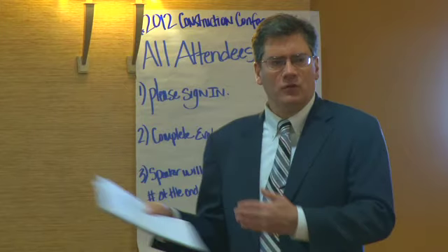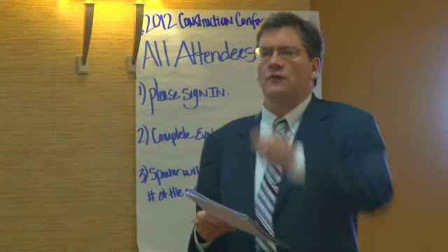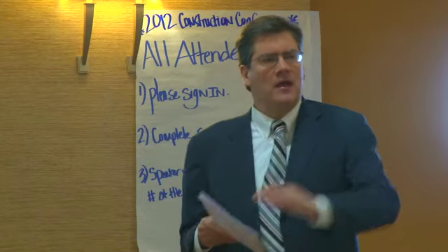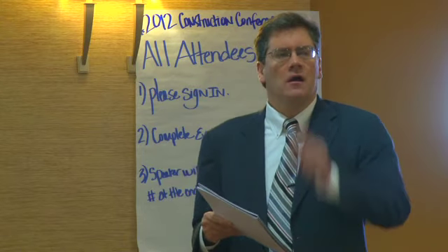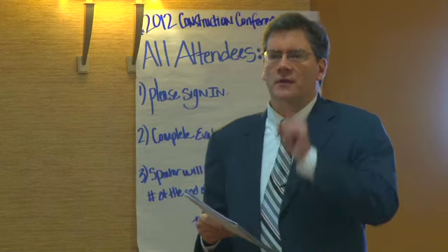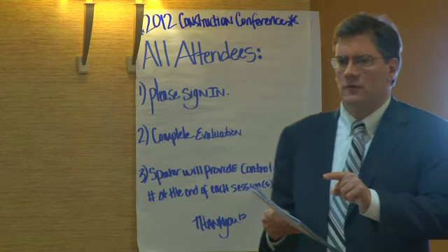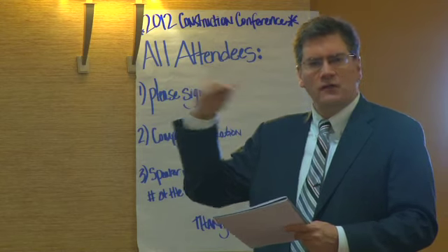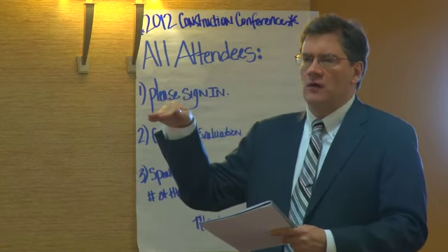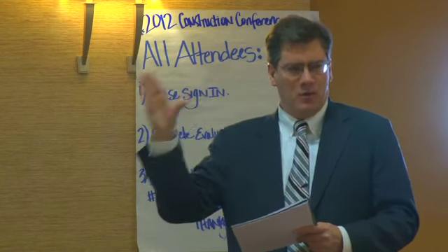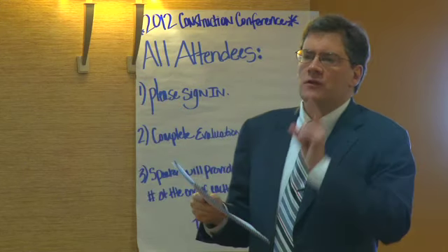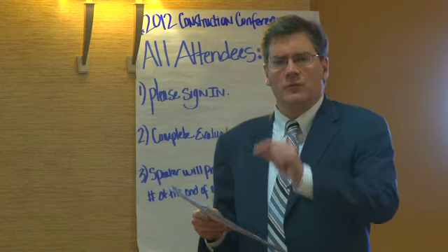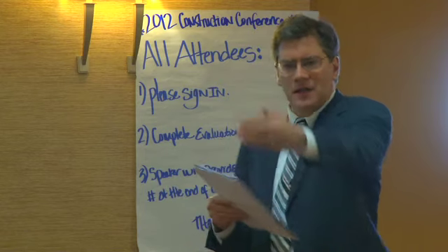Or sign a conditional release for your $10,000. I'll give that to the general contractor, but again, here will be my check, and I'll keep the builder's check. Don't do it. Because if their check bounces, that unconditional release means your lien rights through that progress date for those invoices are waived. If you have any doubts about the check you're going to get from your customer, then you've got to keep the builder's check.